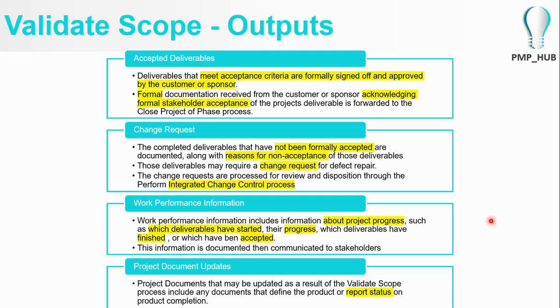integrated change control process, where you as a project manager have to fire back to your project management hierarchy, or your management, saying that yes, this is a CR, a change request, but it's a costable change request. I mean, it's a chargeable change request, and the customer agrees, so there's a cost impact, there's a time impact. That's why we have to go to the integrated level. Or sometimes you might have to take more resources to get it delivered. So there can be a number of things happening at that stage.